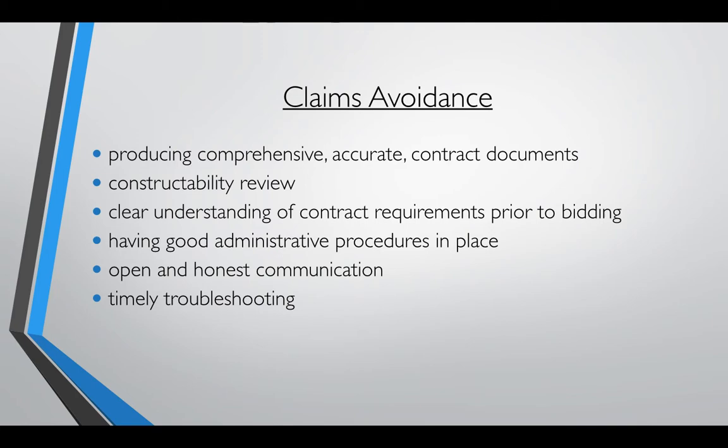Constructability review starts during the design phase, and the designer, the quality control, quality assurance design team is going to look and make sure that the design documents can be, basically, that the construction work out there can be produced as what they're showing on these plans. Do they have enough? Does this configuration of what they're trying to build going to make sense? We have to go through that constructability review. Can this actually be constructed, right? So that's what constructability review is.